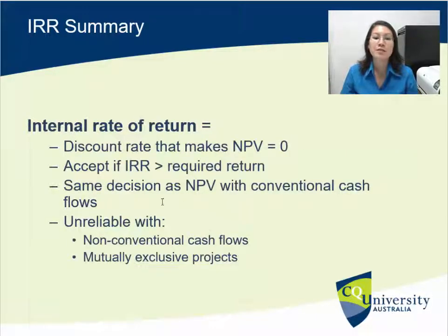Internal rate of return is the discount rate that makes net present value break even at 0. So we accept it if our internal rate of return, our percentage rate, is higher than our required rate of return. It's the same decision as net present value with conventional cash flows, but it's unreliable in these two instances. So just be aware of that. Don't use it if you've got those two instances.